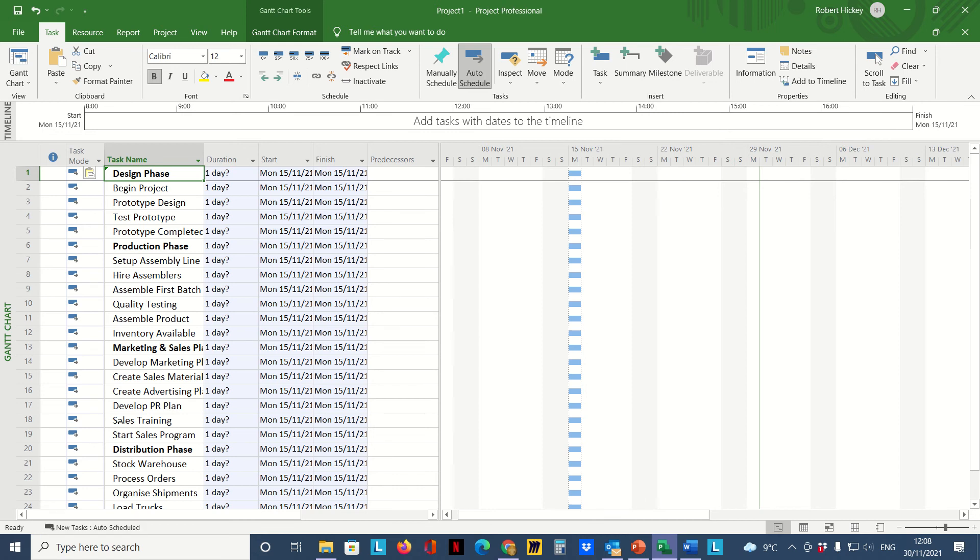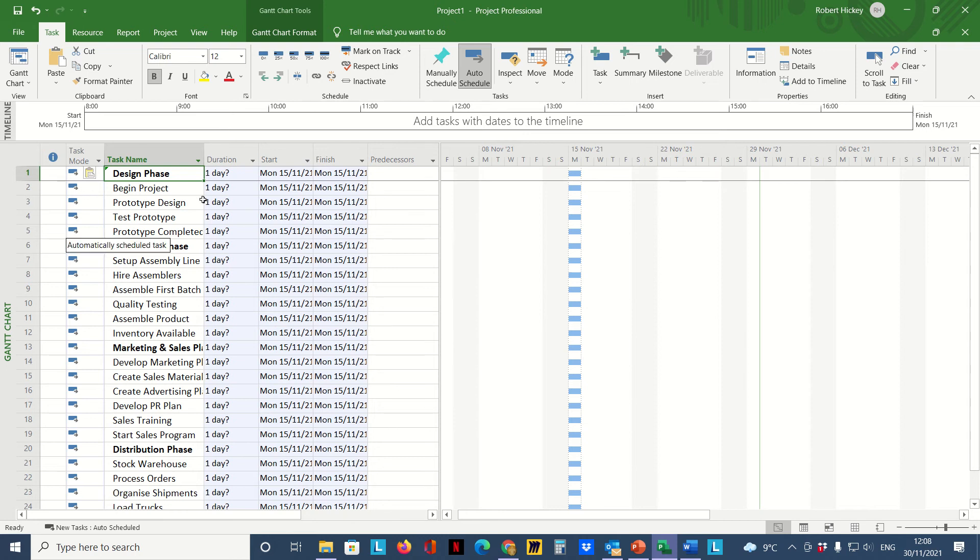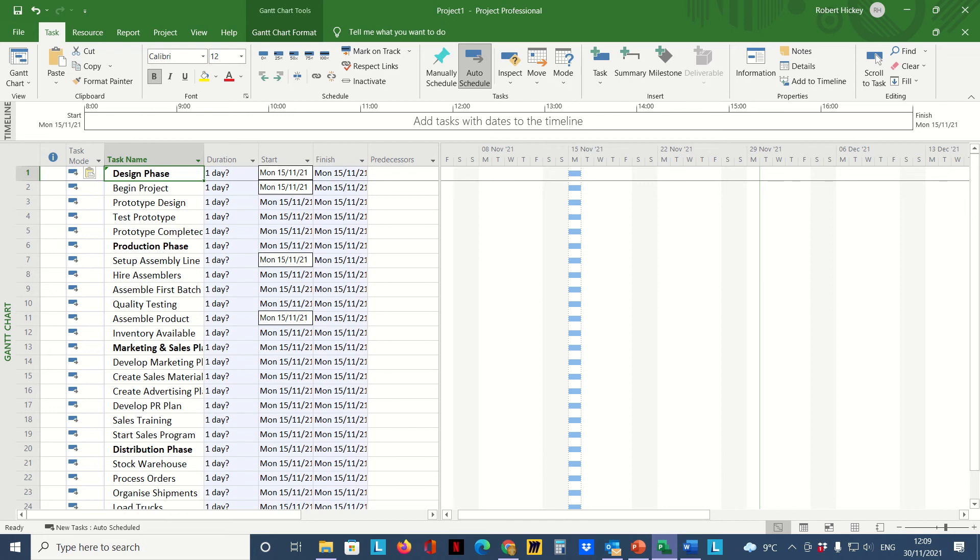Now we see we have all our tasks in there. The task mode is automatically set to Auto Schedule. Because we're set to Auto Schedule, that means a duration has to be applied, so by default it just puts in one day. We can also see the start date is the 15th and it's the same for them all because none of the tasks are linked together yet.